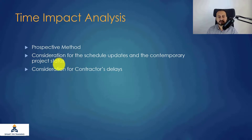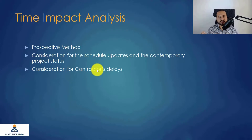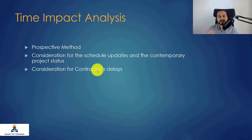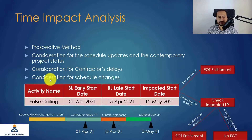There is consideration for contractor delay, because if I am using the schedule update it will show the project status — no matter who is responsible for the delay. With the schedule update, any activity can be delayed and drive the longest path and the project completion date. So all delays in the program — whether client-side or contractor-side — are considered.